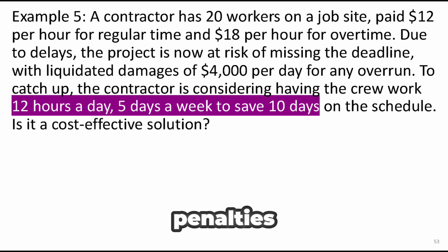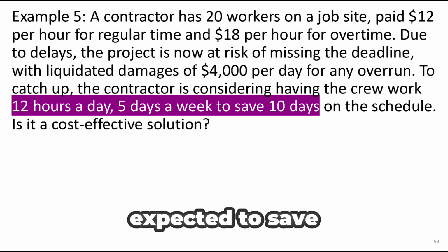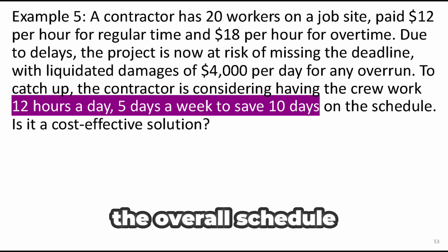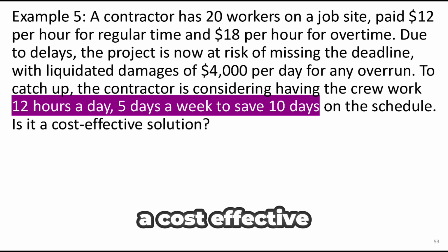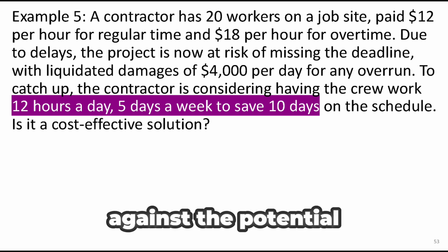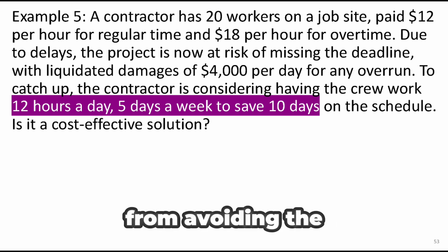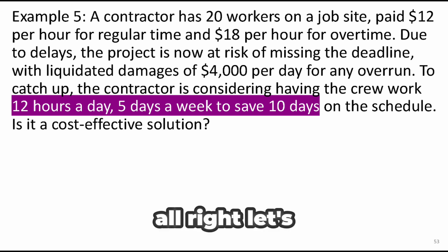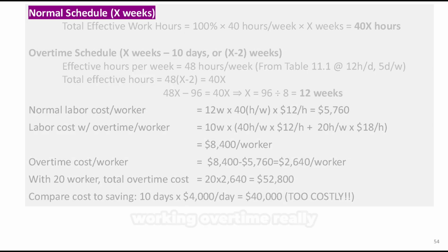To avoid these penalties, the contractor is considering a change in the work schedule. The new plan is to have the crew work 12 hours a day, 5 days a week. This adjustment is expected to save 10 days on the overall schedule. So now we ask, is this a cost-effective solution? To answer that, we'll need to compare the additional labor cost of the extended work schedule against the potential savings from avoiding the liquidated damages. All right, let's walk through the solution and see if working overtime really makes sense in this case.